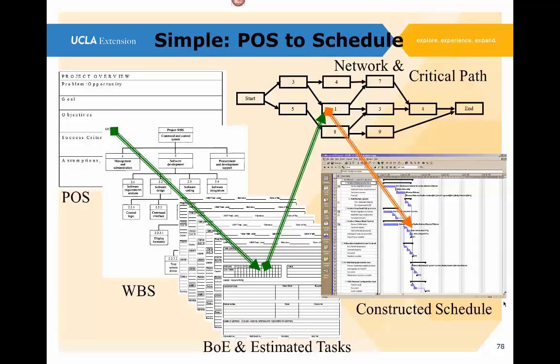By taking our simple project planning through these cycles, at the point where we have our Gantt chart finished and tasks loaded, we can see what tasks are going to be done at the same time, which ones come first, which ones come second. We can load our resources from our basis of estimate sheets, and we can also load the fixed cost, hourly cost rates, or any cost for materials or anything like that.